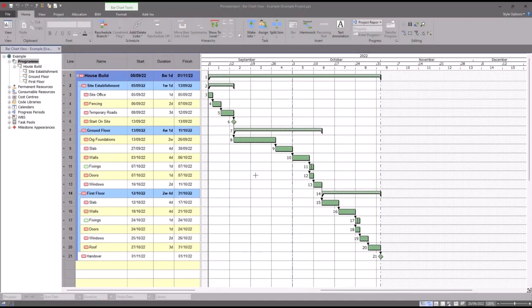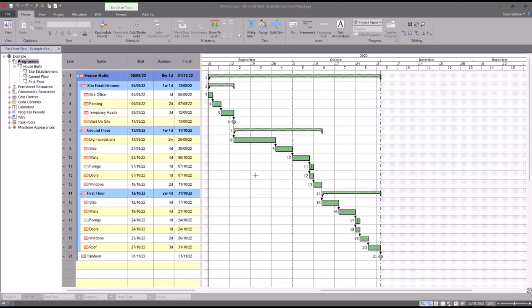In this video we will look at how and why you should take a baseline. A baseline is a snapshot of your project. It will include all of your durations, your dates, resources, costs - everything in your project at the point when you take that baseline.